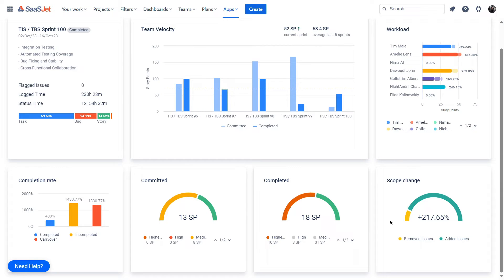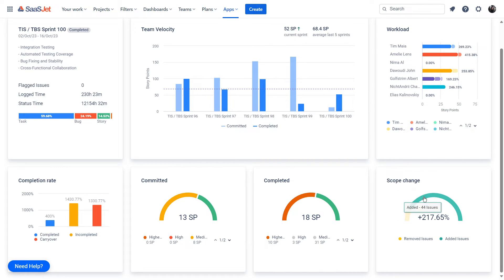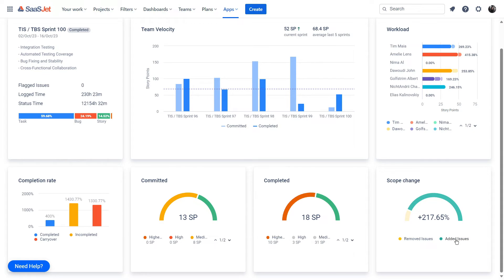Finally, the scope change section reveals any adjustments or modifications made to the original plan during the sprint. It shows added and removed work, helping you understand how the sprint's scope evolved.